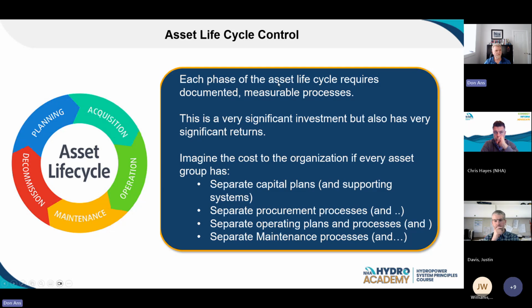So each phase of the asset life cycle requires documented, measurable processes. It's a very significant investment, but also has significant returns. I've actually seen measurements done for the oil and gas industry, never for hydro, where they talked about almost a ninefold return on the investment of setting up these systems during the construction phase versus waiting till after the asset was put in service.